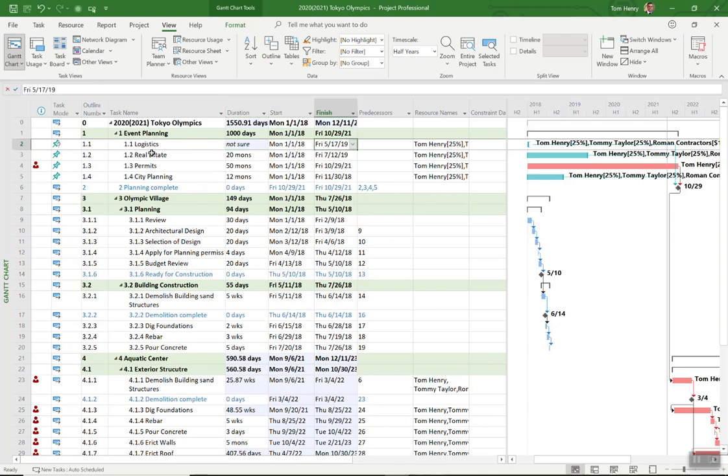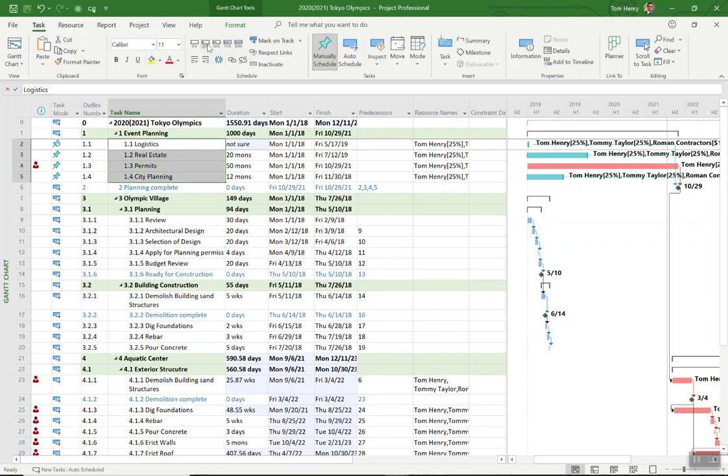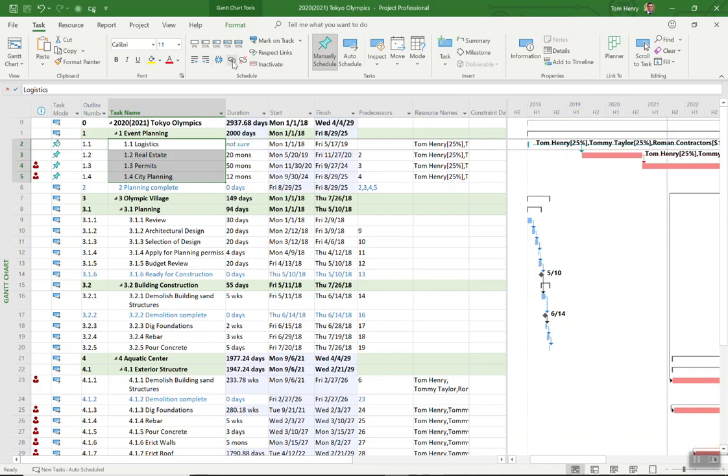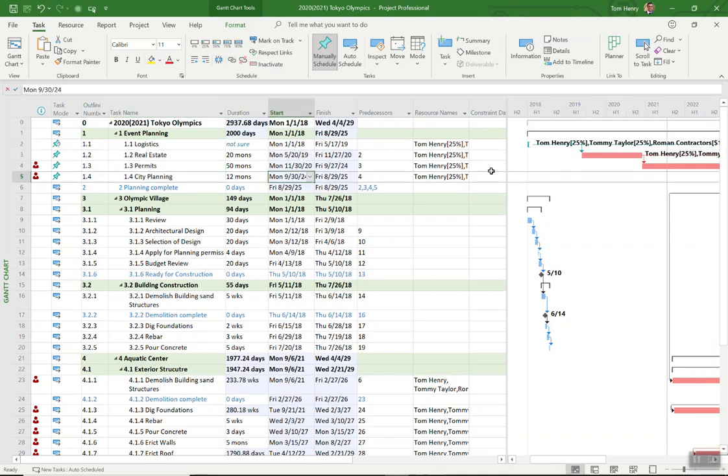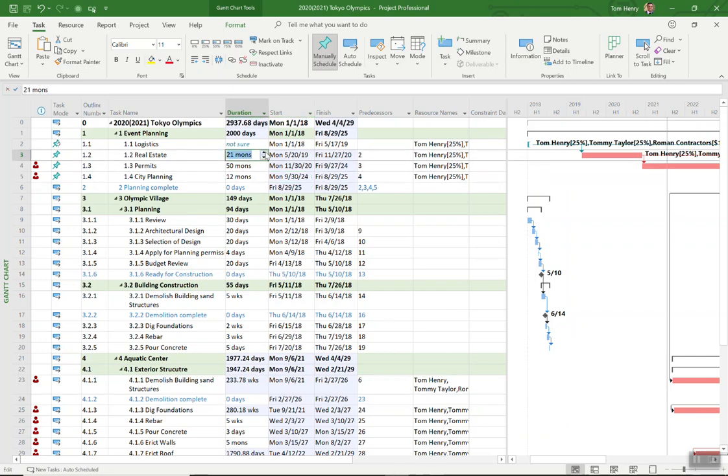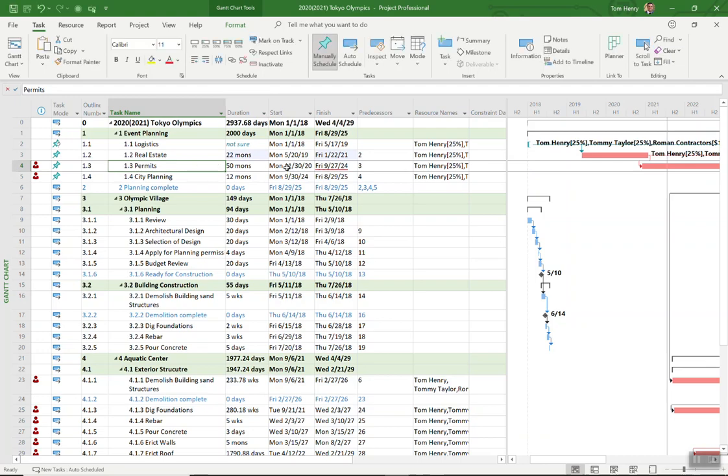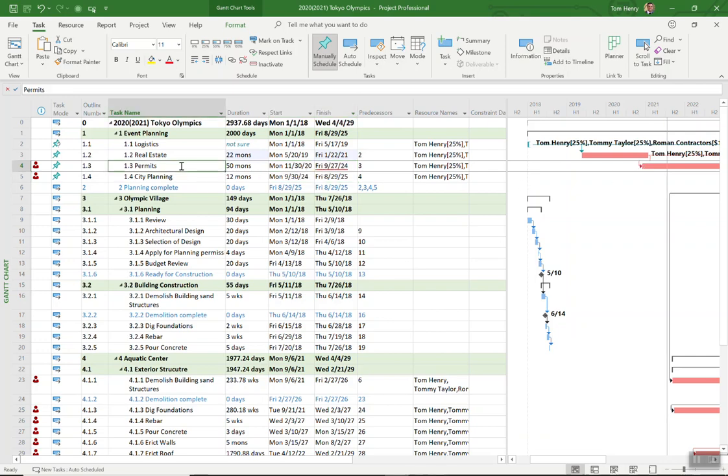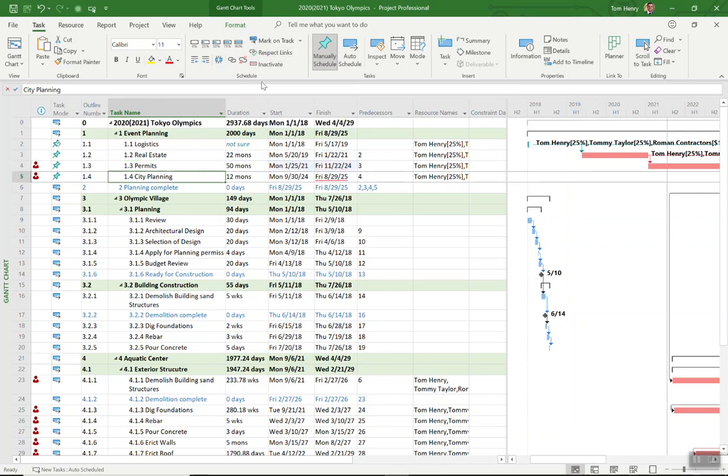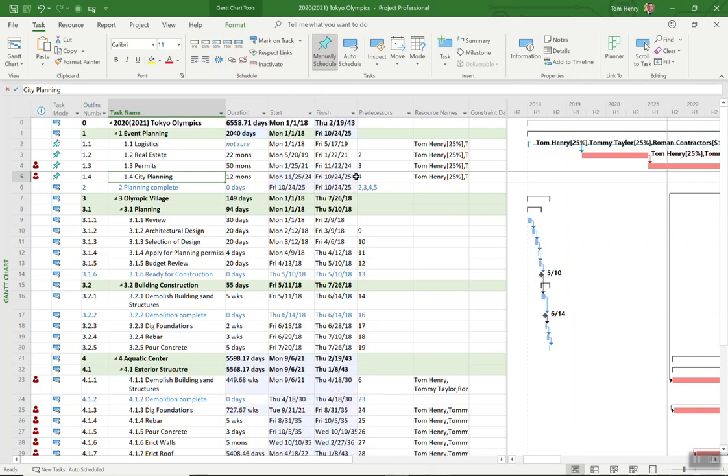So you're in control of everything and essentially if those tasks are linked together, you can see things are pushed out as you do that, the dates change. But as they change again if I go from 20 to 22 months you can see that none of these dates were affected because it's a manually scheduled task. What I essentially have to do is come in and manually update that or I could come in and click respect links and push them out manually. So it's very manual.